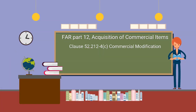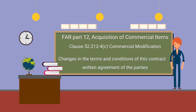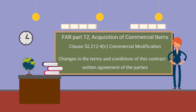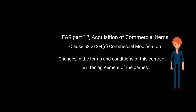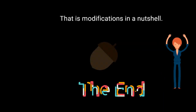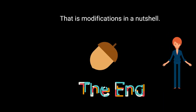If your contract is a commercial purchase under FAR Part 12, you will include Clause 52.212-4C, Commercial Modification. According to the clause, changes to the terms and conditions of this contract may be made only by written agreement of the parties, meaning the contractor and the government. And that is modifications in a nutshell.